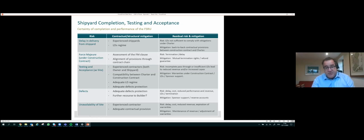Similarly, the FSRU sponsor will not be prepared to accept any delays attributable to the facilities at site not being ready to accommodate the FSRU, which in turn delay the FSRU sponsor's ability to undertake the final acceptance tests under the charter.